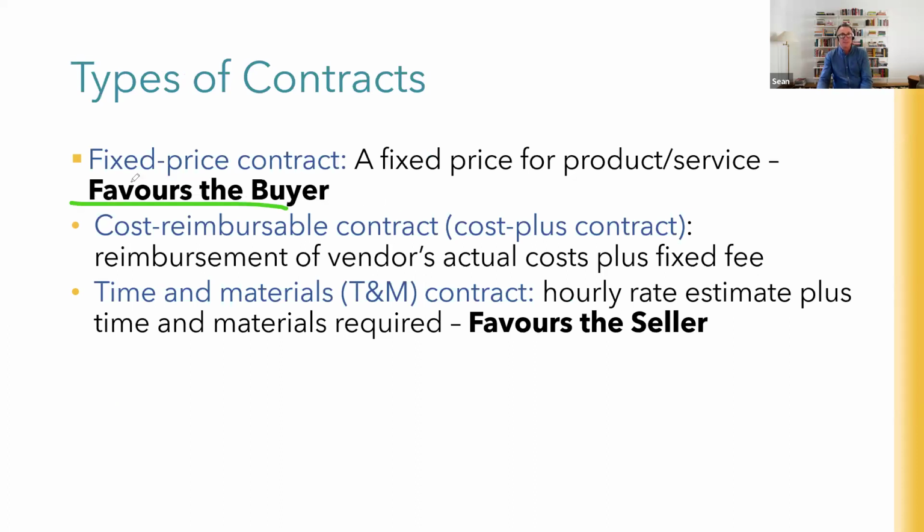At the other end of the spectrum, every seller would love a time and materials contract. Just keep working and we'll keep paying. Of course, it favors the seller. The buyer just has to keep paying. No maximum, just keep paying. These can be useful for emergency works or very short, complex works that aren't really going to cost you too much, and negotiating a big fixed price contract just doesn't warrant it. So small amounts or emergency works, time and materials works fine. Apart from that, generally not.